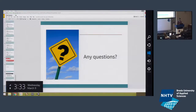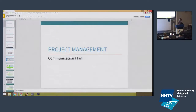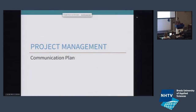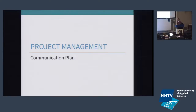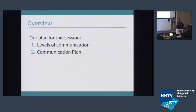The second topic is communication plan. Some of you have been using the communication plan learning objective for internal communication — communicating with your team through Slack, a Trello board, daily stand-ups. What I'm talking about now is specifically an external communication plan. Often this is part of the project proposal and sometimes becomes an appendix of the contract. It states who's going to communicate with whom, who's taking initiative, so that later when things go wrong, you have something to fall back on. I'm going to talk a bit about different levels of communication, and then we'll go in-depth into what the communication plan is and how you can set it up.